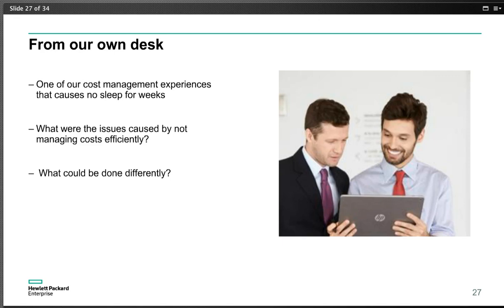The other thing we've seen is projects being green in terms of cost metric month after month after month, and then in the last 2 months, either the month before they go live or 2 months before that, it suddenly changes from being very green to very red. Obviously, we all know 80% of most project work is done in the last 20% of the time, and then there's another 80% added to meet quality and scope requirements. But that's always the case, right?